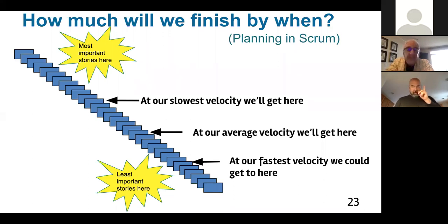So does that mean that in a backlog, each backlog item takes roughly the same amount of time? Yes, because all of these stories were of the right size to fit into a sprint. That means that while they're not all identical, they're all of a certain class. There's a bell curve in terms of size, but that bell curve is reasonably manageable. So the rough answer to your question is, yep, they're all about the same amount. It would be 2 people for a day, something like that, if you averaged it out.